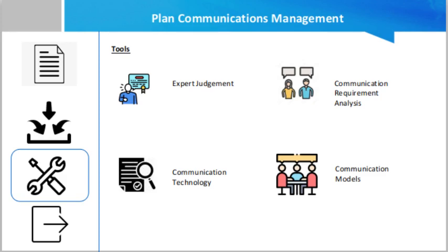Communication models. Communication models can represent the communication process in its most basic linear form, sender and receiver, in a more interactive form that encompasses the additional element of feedback, sender, receiver, and feedback, or in a more complex model that incorporates the human elements of the sender or receiver and attempts to show the complexity of any communication that involves people. The other tool is data representation.